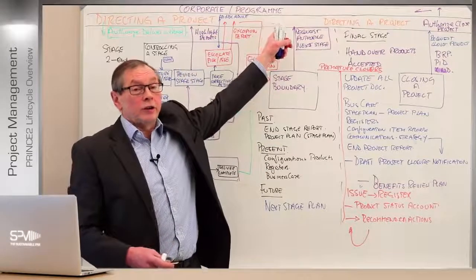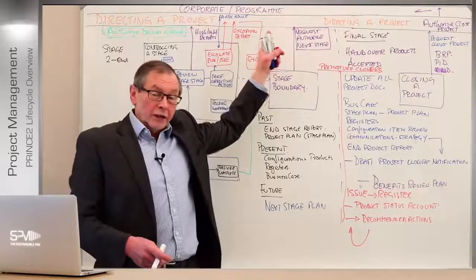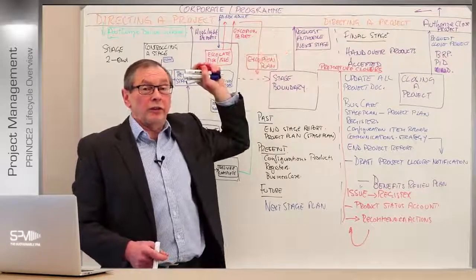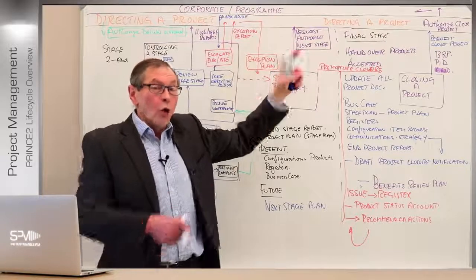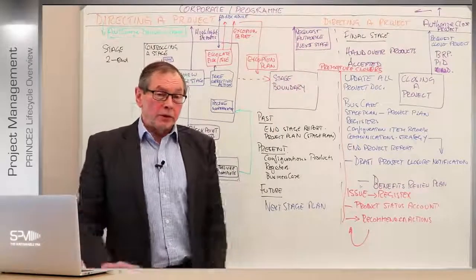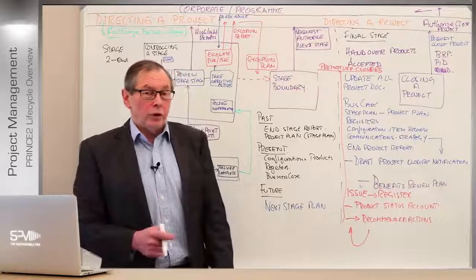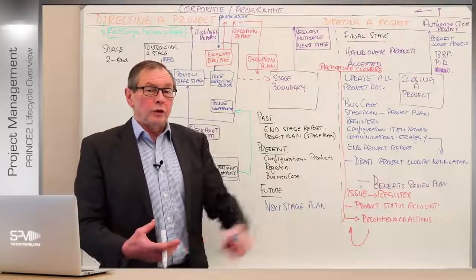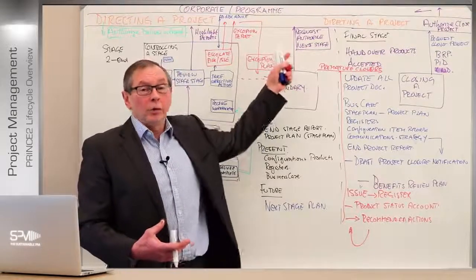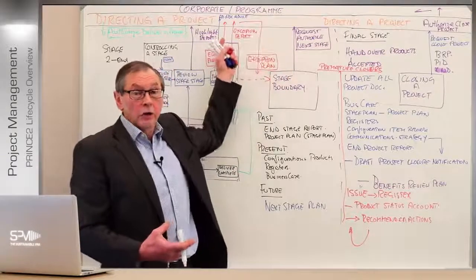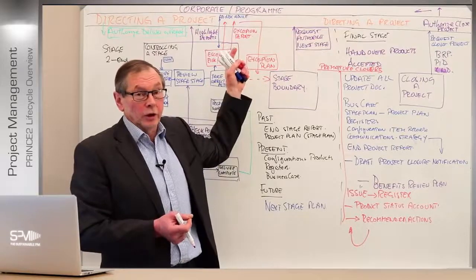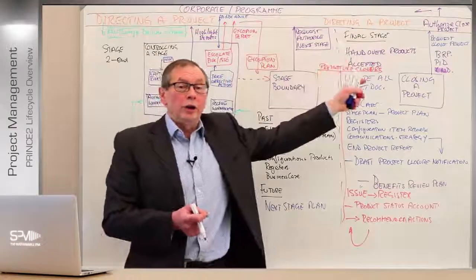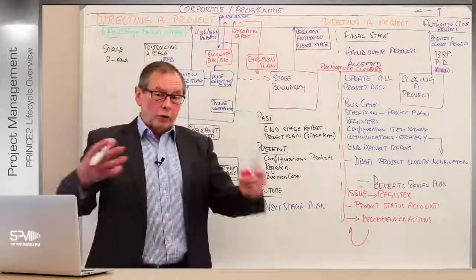Because at the end of the day, it's their project. It's the project executive's project. That role is accountable for the project success. Nobody else. That role is. Right? All we're doing, everybody else is doing, is managing the environment and keeping all the products going through to help provide the solution for the project executive who's leading. They're running it on behalf of the senior user who's at the end of the day going to use the product, right? Or their client's going to use the product, and keeping the track on the supplier who's building it for you. And that's what the whole system's about.